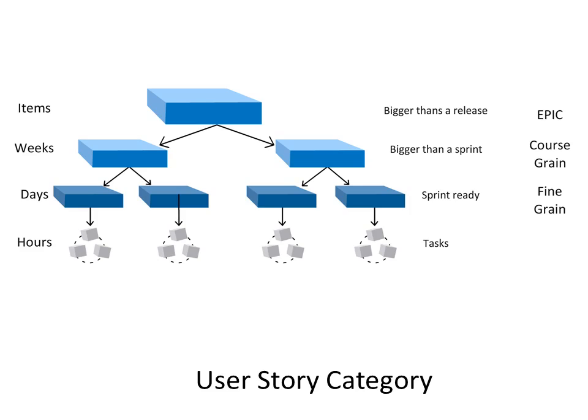Usually it takes days to do, and then these are broken down during the sprint planning into tasks, and the tasks are usually measured in hours and are done. These are ready for execution by the team during the sprint execution.